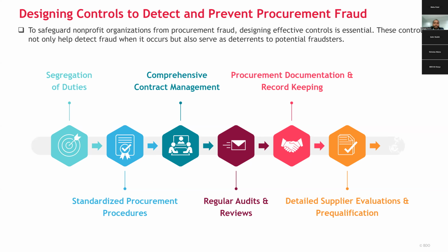You can have specific performance milestones within contracts. For example, for us, if we are doing a particular investigation, we will have specific times at which we are paid, either on mobilization and then on delivery of the report. And it's obviously different with each industry. You can also have regular status reports and deliverables to monitor compliance with your contract.